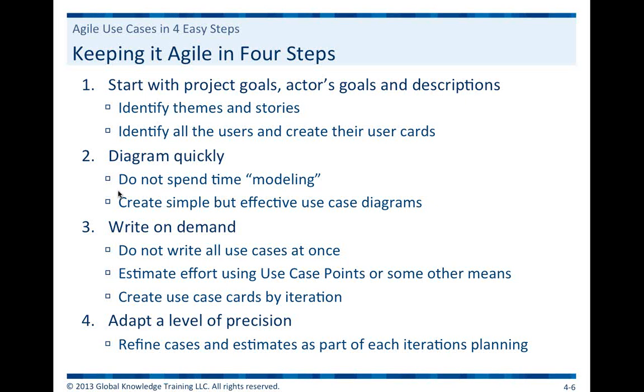The most unusual part of this planning is that it's done by the project team as a team, as opposed to the manager him or herself. And this is very much a unique thing when it comes to an Agile environment. Traditional project management has us accepting a plan from the project manager, although that's not something I would prescribe in any case. Even in the most traditional waterfall environment, I would always want it to be collaborative. However, when you're working in an Agile environment, engaging the team members in regular planning ensures that the plans are as realistic as they can be.